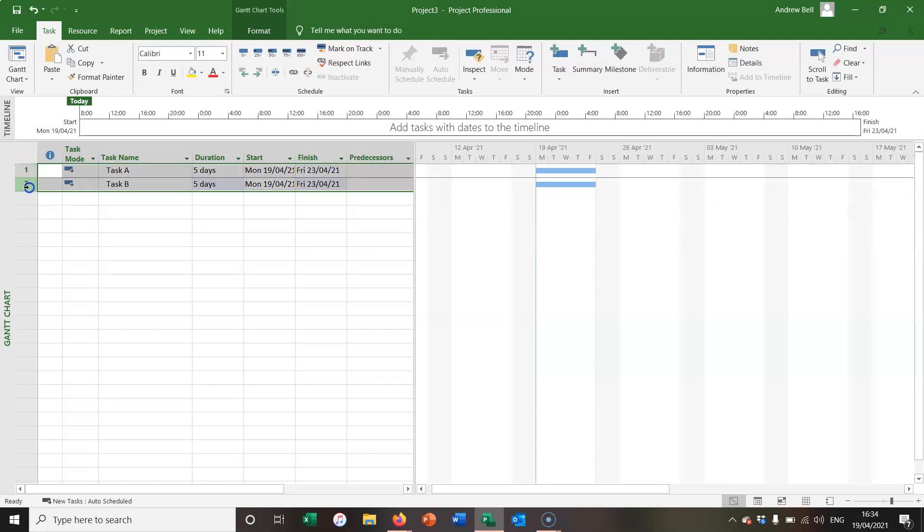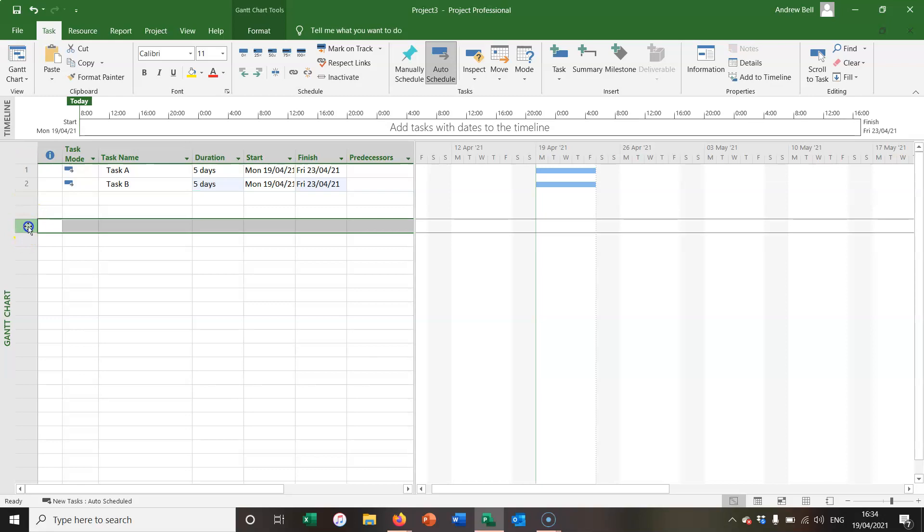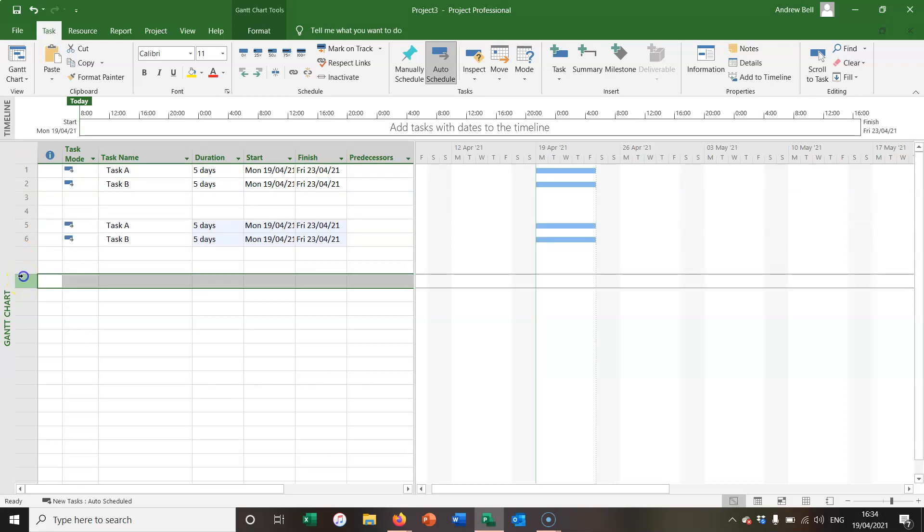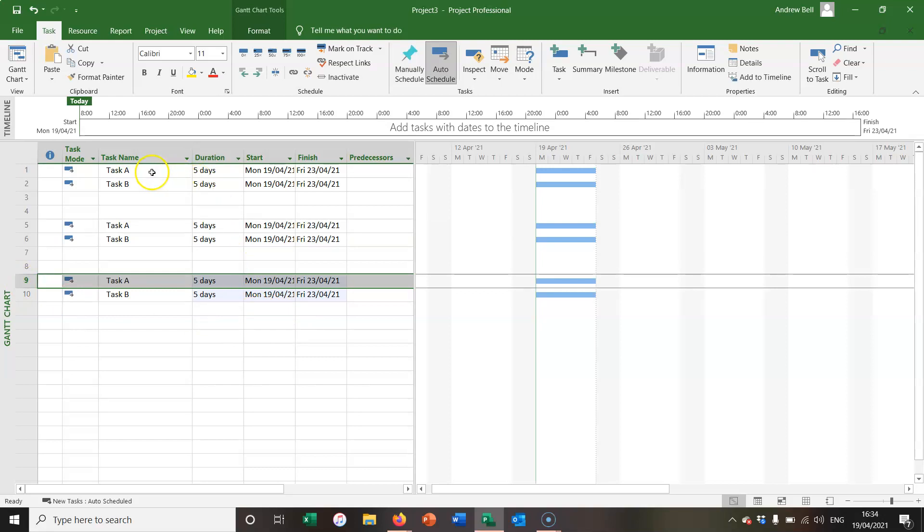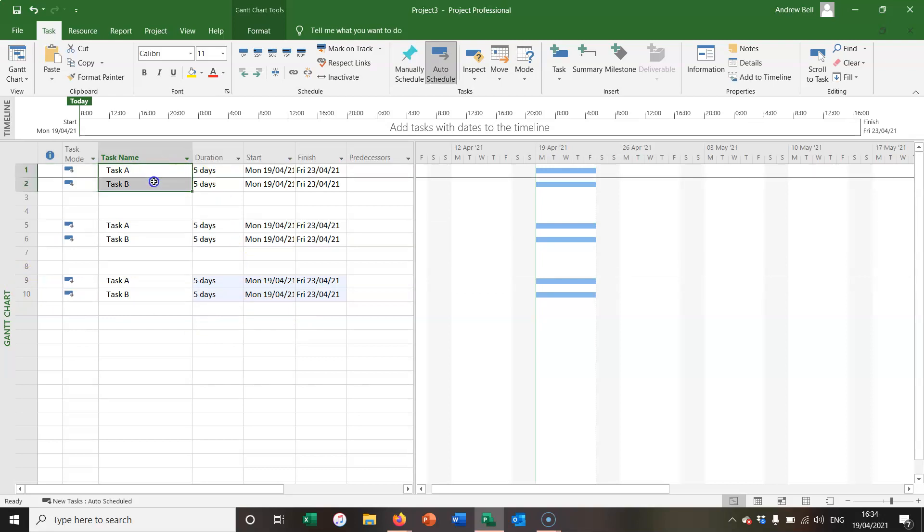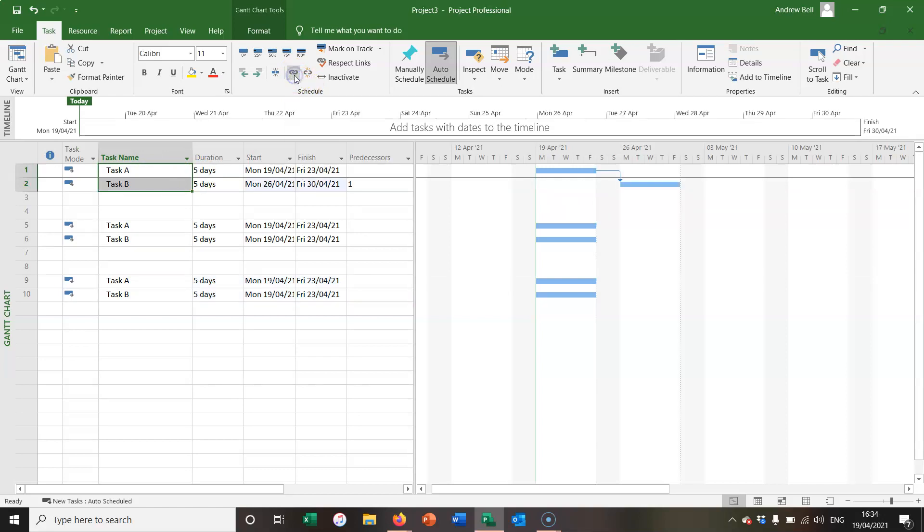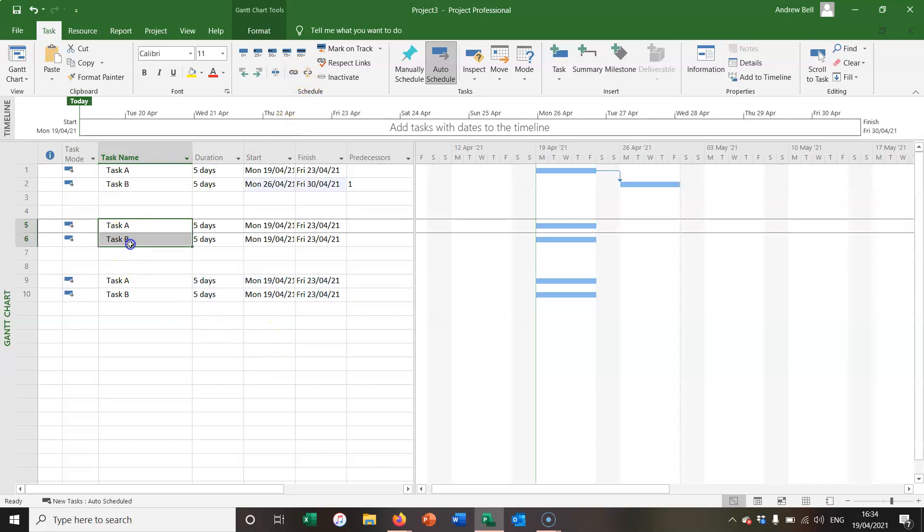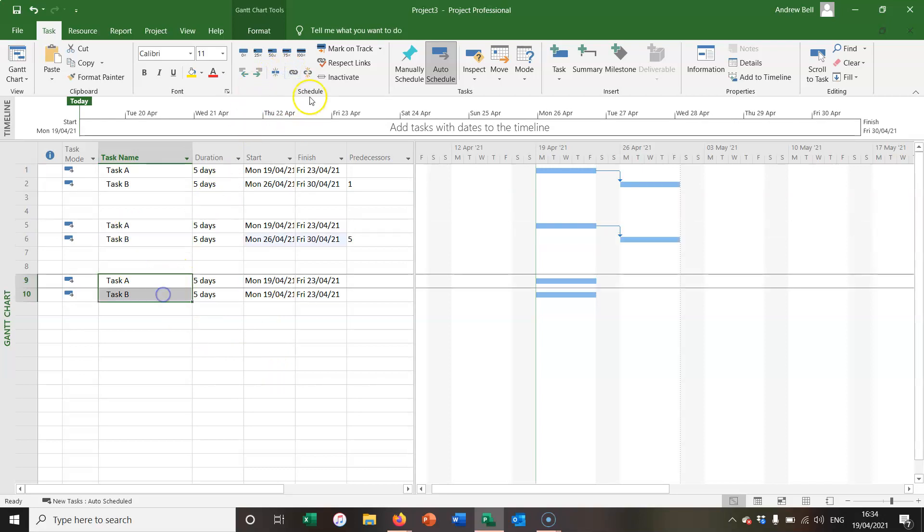And I'm just going to grab those two tasks, control C to copy them and paste them and paste them. First of all, I'm going to take the first two tasks and link the tasks together in a finish to start relationship. And I'm going to do that for the second and third set of tasks as well.